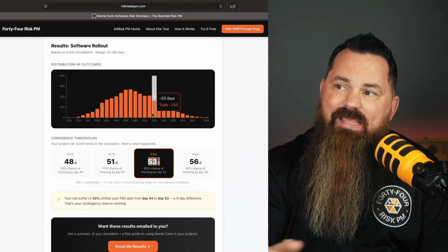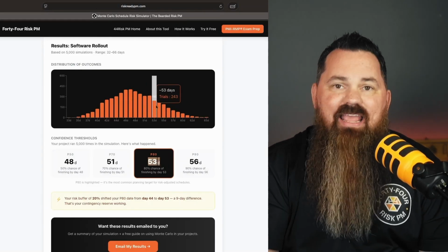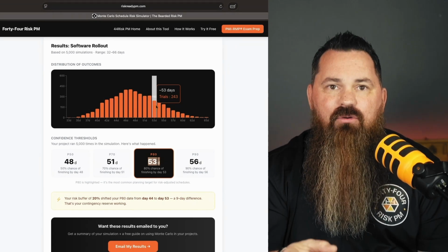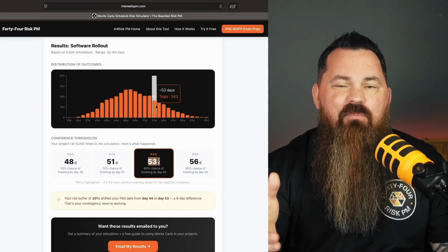But going back to our P80 date, we already know that this date is the 80% solution. That is usually the best date to commit to with your stakeholders. Not because it's the latest, but because it's the most defensible.